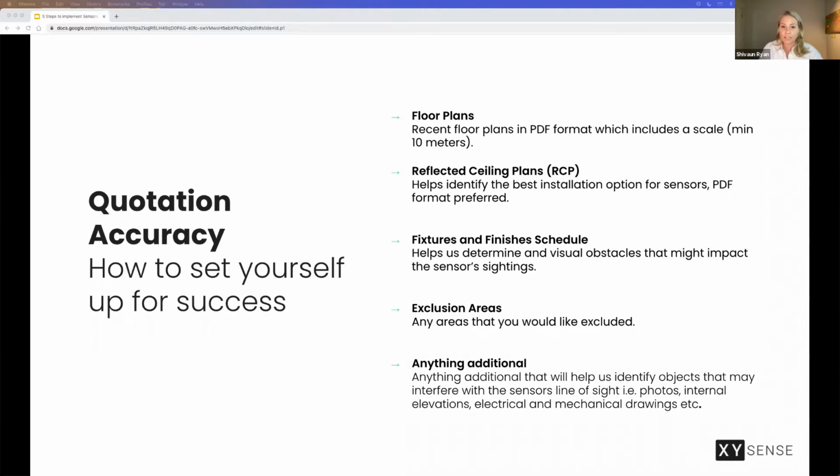We're also finding a lot of designers and interior fit out companies are liking to hang, for aesthetic purposes, a lot of different things from the ceiling to make a design look cool. Seeing things like saucepans, plants are becoming very popular, and they just don't seem to appear, especially plants, on a plan anywhere. So we do suggest that we do get provided, if there's anything unusual in terms of the fit out that's going in that might actually obstruct a sensor, that we do get notified,